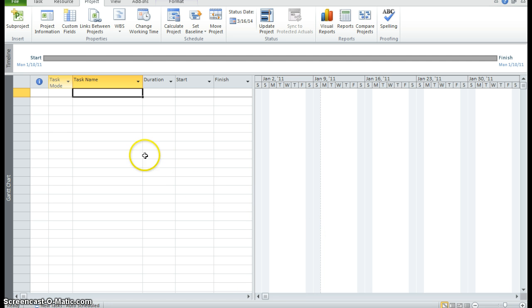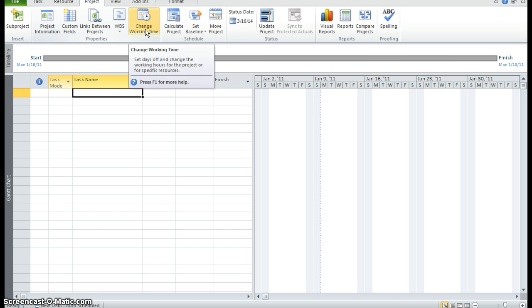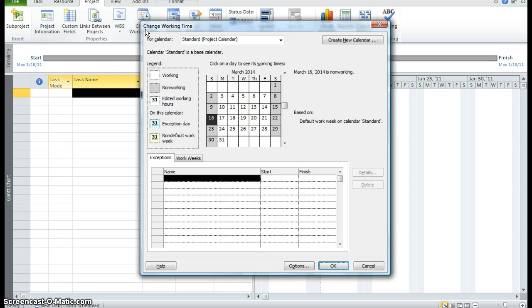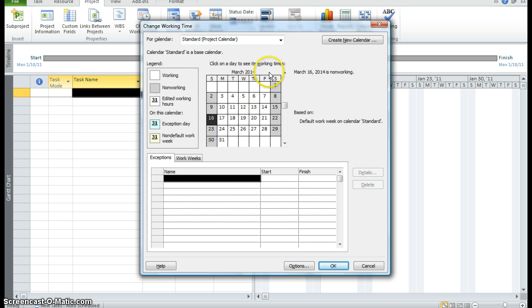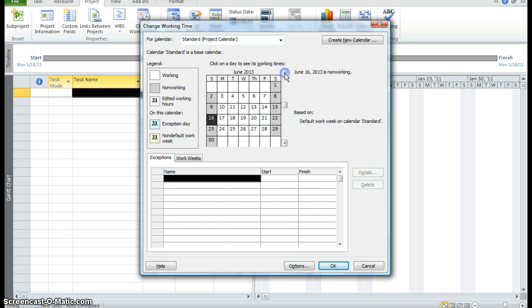Now we want to go to the properties group on the project tab. Click on change working time. Because we have to make sure we put in any non-working dates. We see this calendar is set to March 2014. But our project starts January 2011.